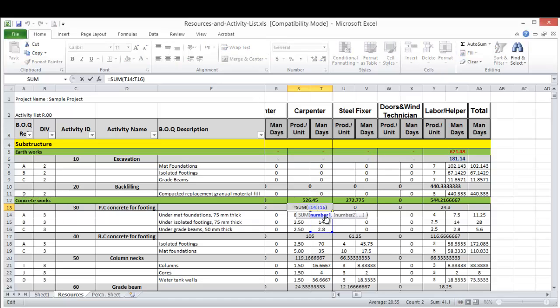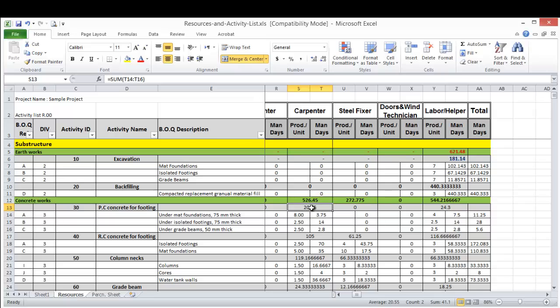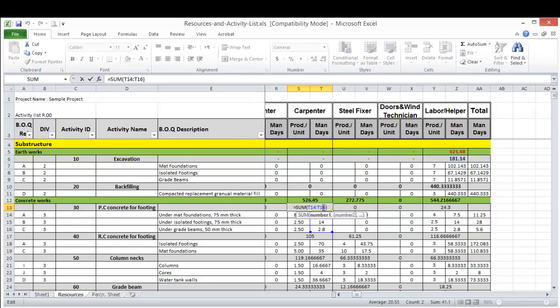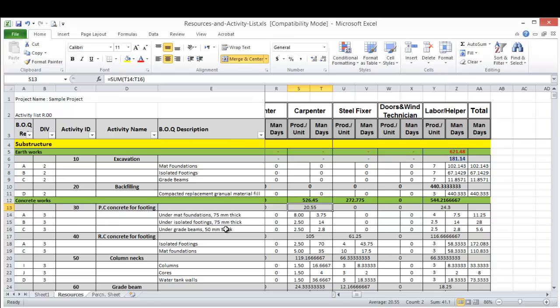And this number only will go to the Primavera. The total carpenter required to execute this activity is the submission of that individual number for each item in the BOQ.